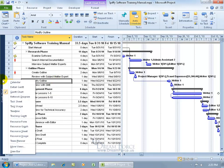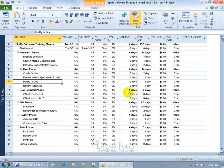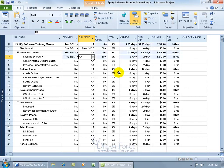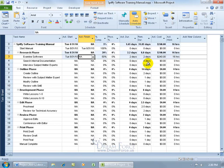Let's right click and go back to the task sheet. And then if we come over here, we change this, the remaining duration from 5 to 4, that's the actual duration of the plan now, and we say 50% complete, then it goes off the plan from 4 days saying, we've actually completed 2 days, we have a remaining of 2 days left, and so the cost is $240 for 16 hours, we're halfway through. So again, just remember, the remaining duration, don't change anything in it if you don't want to change the plan, otherwise use it as a reference as when you're updating the progress of your task to see how much you have left.